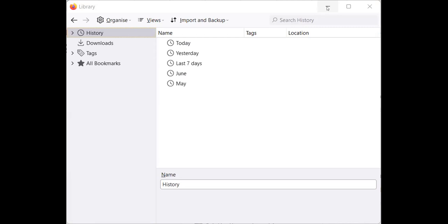This runs for multiple days. This will trigger off. It will notify me that Chris has not submitted this. And it becomes a project risk. Whatever we are doing, even as a virtual assistant, you'll find that you'll be working in a situation like this as project support. What you'll be doing is to make sure that if this is due on Friday the 8th, on Friday the 4th you might send a reminder to Chris about this, or on that Friday, you might remind Chris that you have not gotten your delivery.